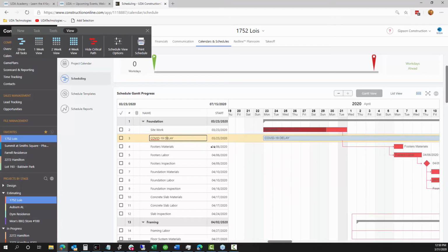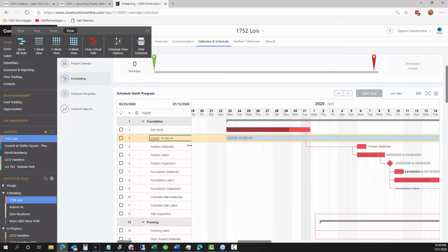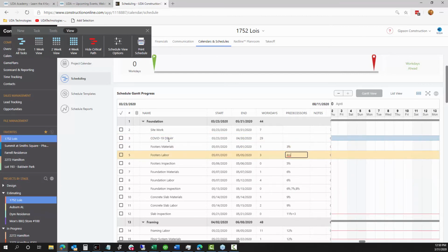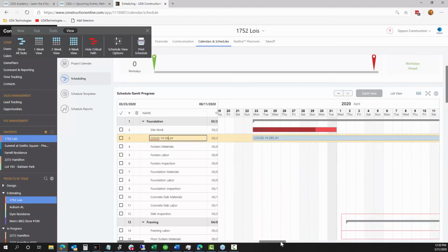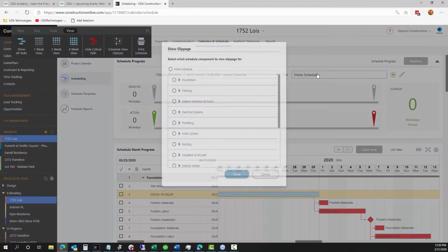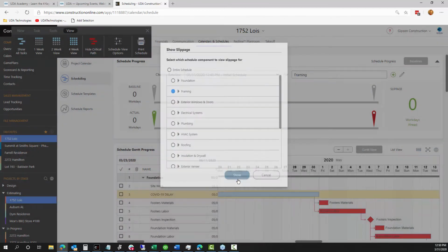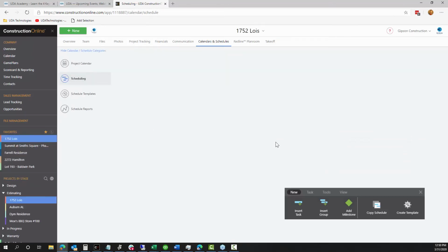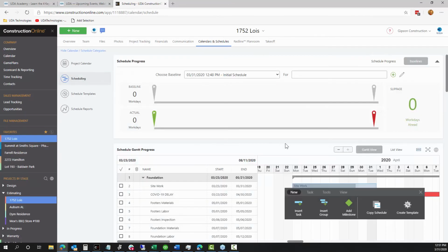So we're now tracking our delay inside of our schedule. None of the other tasks really are keying off of this task just yet, but they will in just a moment. So now we can start to see, well, most of the tasks inside of our schedule have now been pushed far into the future. We're tracking things like, well, now our photos, materials, and labor, everything is now kicked ahead pretty much 1 month. So if we start to work through our baseline now, what we're going to start seeing is that everything that we projected at least is going to be moved ahead by some considerable amount of time, roughly 1 month. And we're going to start seeing that both on an individual group level basis inside of our baseline